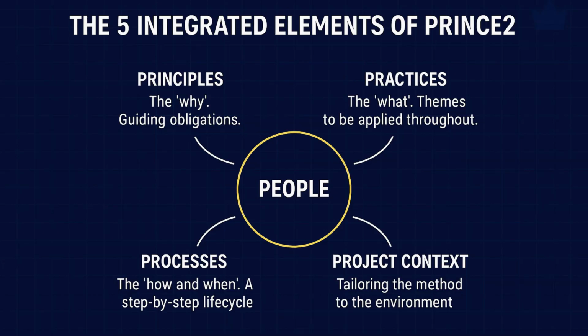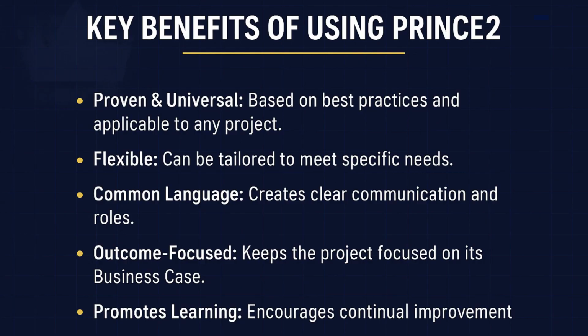And the controls themselves. Yes, adjusting the project controls is key. How often does the project manager need to report progress? Right. Weekly? Monthly? How tight are the tolerances for cost and time? Plus minus 5%, plus minus 20%. How rigorously do you apply the change control procedure? All these are tailoring decisions.